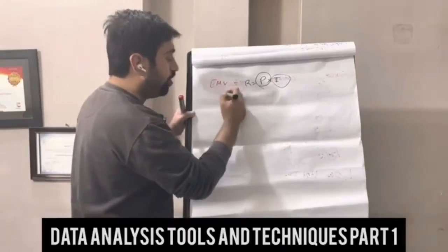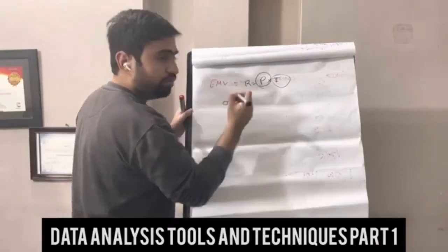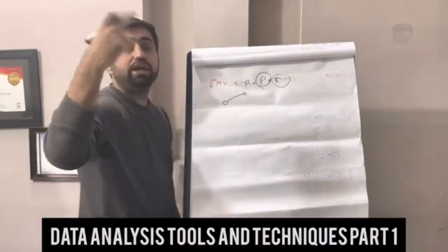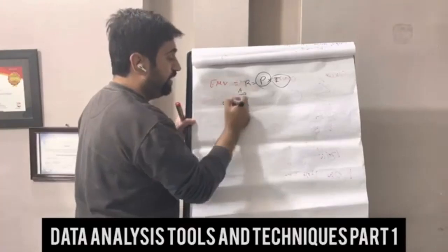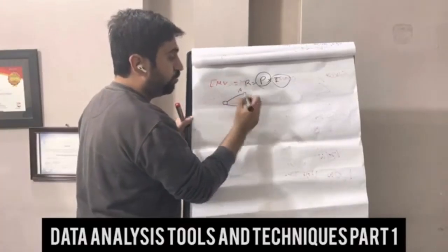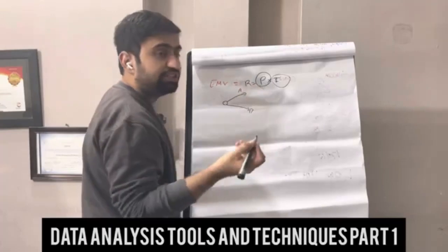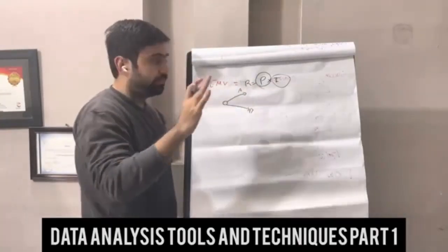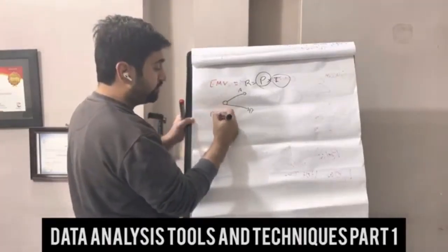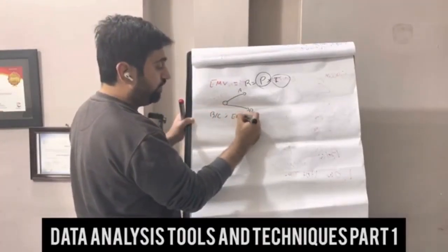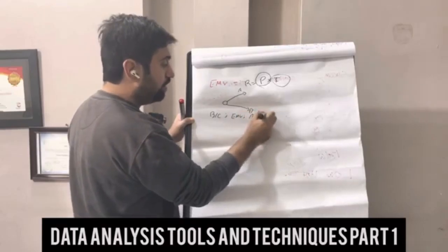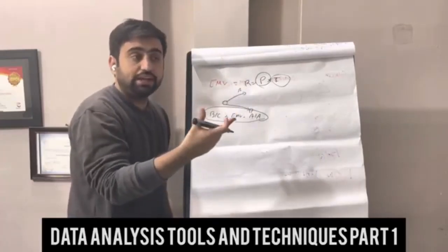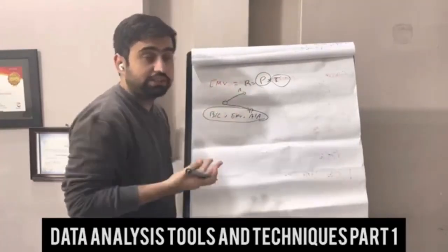So in a decision tree, normally we are comparing two options. The classical example is, should we make it in-house or should we buy it from outside? So option A and option B. We calculate probability and impact of both options, and whichever has the higher answer, we will go towards that option. If you look closely, benefit to cost, expected monetary value, and alternate analysis, all these three are actually being used to compare one or two things and to find out the reason.